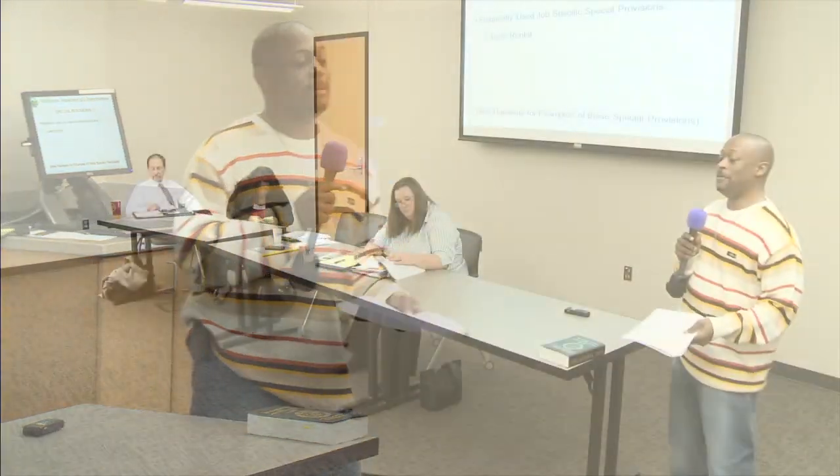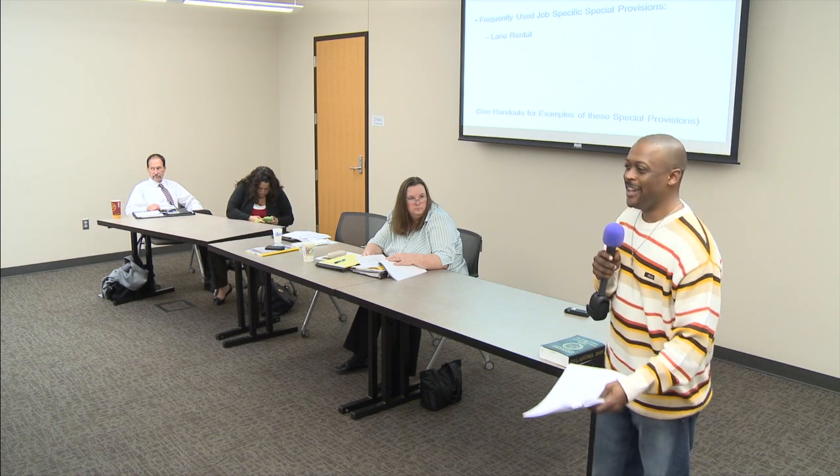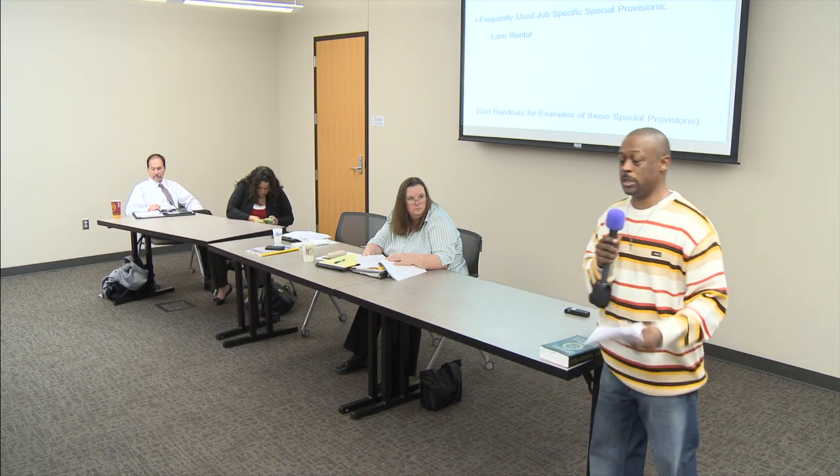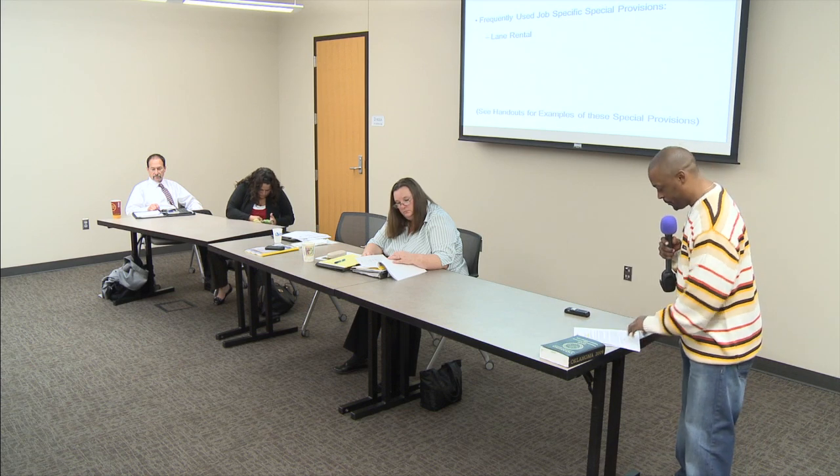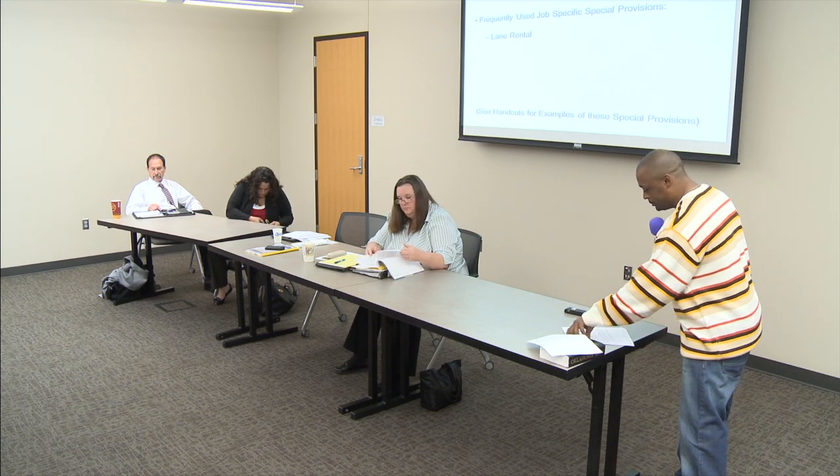So the sooner we can get the road open, the better, and we'll give him an incentive, and it'll be defined. In this one, if you go down to that third paragraph, it tells them the rate we're going to pay: $4,000 a day for every day less than 150 days. We gave him 150 days to substantially complete the work. Then we cap him off at 25 days. So the max incentive he would earn on this project, if he finished it 25 days ahead of the 150, is a $100,000 bonus. If he misses that date, then that $4,000 becomes an assessment that we assess to the contractor until he gets the road back open or substantially completes the work. That's how these work.